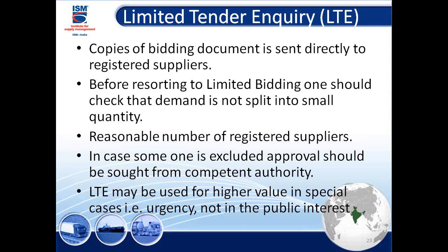We had a wonderful system in our ERP. Some people will split the contract so they don't have to go and get approval from X and Y. They go on splitting the contract month by month, but when you add it over the year, it used to exceed the limit, which may require a different type of competition. So our system used to check that people are ensuring compliance.